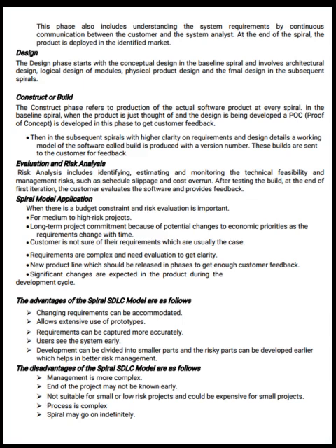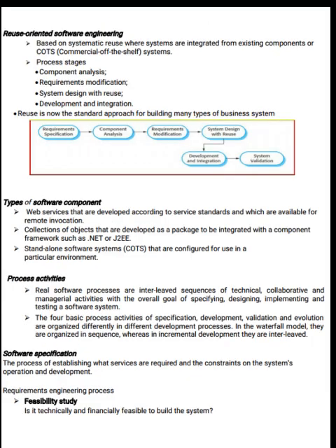The disadvantages of the spiral SDLC model are as follows. Management is more complex. End of the project may not be known early. Not suitable for small or low risk projects, and could be expensive for small projects. Process is complex. Spiral may go on indefinitely. Large number of intermediate stages requires excessive documentation.